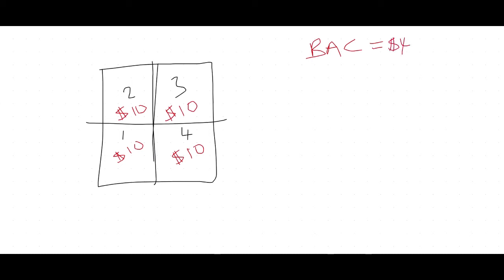Now, the $10 that you see on the different days, these are known as the planned value. Planned value is different for each time period in some projects. In this case, it's the same for all the days. So we could say the planned value for day 1, for example, is $10. The planned value for day 2, same thing.